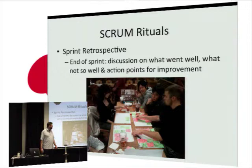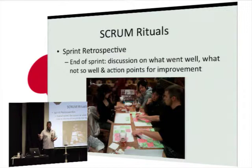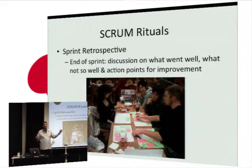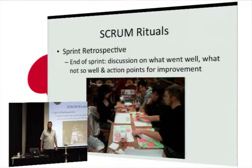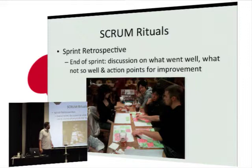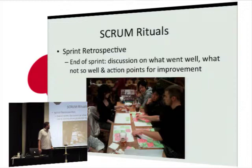In the retrospective you get an incredible range of feedback. We use yellow or green stickies for good things and pink stickies for bad things. I get everyone to do all their stickies straight away — first negatives then positives — then read through and discuss them. Some teams group them into common themes; if lots of people said the same thing it gets higher priority and more discussion time. The idea is to get the team thinking about continuous improvements in the process, the way they work, and particularly the way they work together.